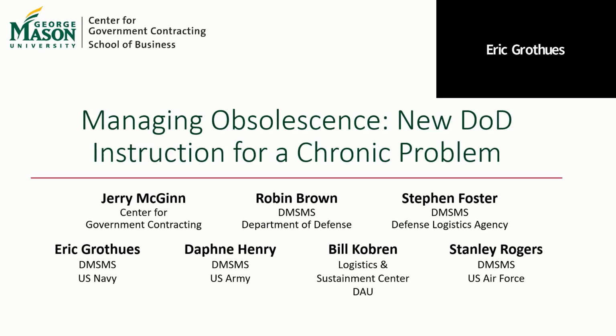We haven't gone to compliance. Like I said, we look at that during our independent logistics assessments, a review we do at milestone B, C, and full rate production every 5 years. But you also should look at the different technical review events: your CDR, PDR, PRR, and even your MRAs. Of course, at those reviews you're looking at the contractor's plan. Typically it's going to be a CDRL, right? Hopefully using DSD 26 as a guide.